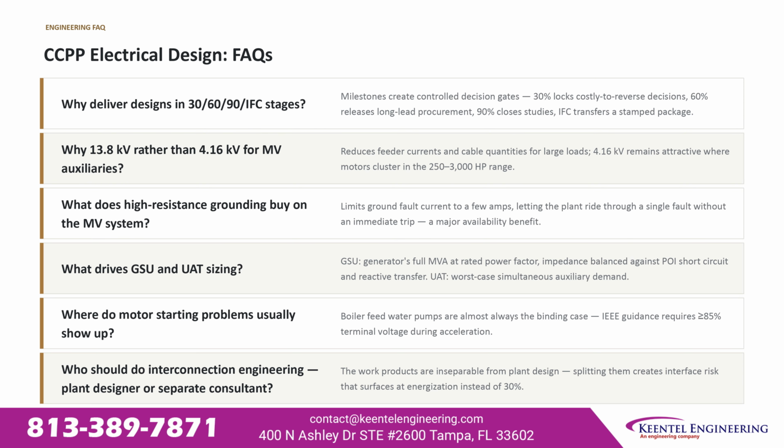Where do motor starting problems usually show up? Boiler feed water pumps are almost always the binding case. IEEE guidance requires 85% or better terminal voltage during acceleration. Who should do the interconnection engineering? The work products are inseparable from plant design. Splitting them creates interface risk that surfaces at energization instead of 30%.